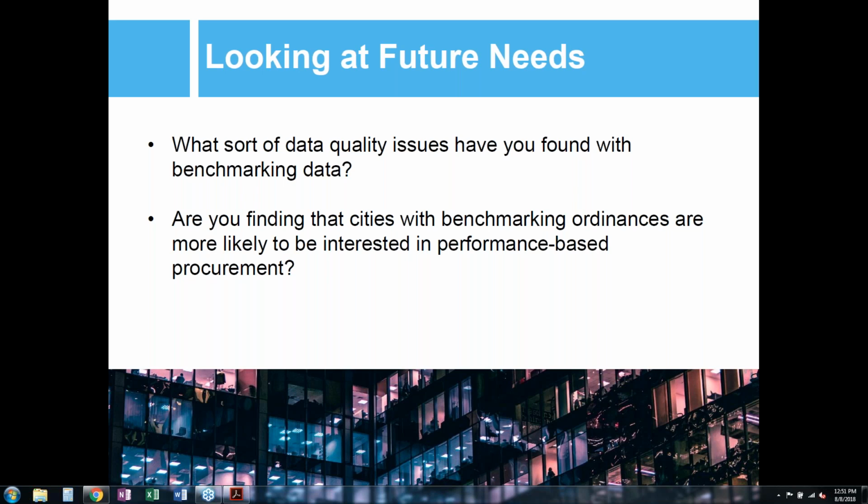Ideally, before any type of design team, architect, or engineer has been hired, we'd like to get at those projects in the planning process or even the zoning process to influence not only the energy efficiency features that they might implement, but also the general form and programming of the building, since clients then have to make some trade-offs between sometimes energy performance and amenities, or aesthetics and energy and all the complexities that need to be considered in design.